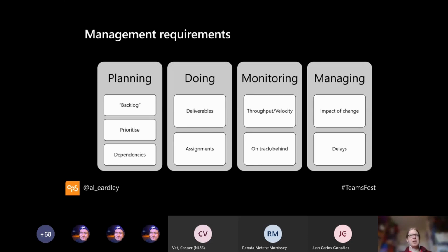If I'm going to start a project, maybe I need to have some hardware delivered. Maybe I need to travel to a location to do that project. So maybe other projects need to finish first, or other tasks and activities need to finish first. So when we start to get into dependencies, that gives us some of our prioritization. It allows us to plan and schedule things.